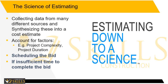Scheduling the bid. Once the scope of the project has been determined, the estimator must schedule the tasks necessary to complete the bid such that the bid is submitted on time. If there is insufficient time to complete the bid, the estimator must get additional help, eliminate some of the estimating steps, or decide not to bid on the project.